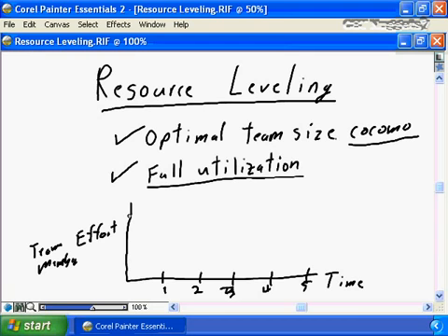And you're going to have a bar at some point, which is the optimal utilization for your team member week in, week out, day in, day out. If you're working on a day-by-day basis, this number is going to be 8, or the reduction of 8 based on the utilization that we talked about earlier. So it's down to 7.6 hours per day.